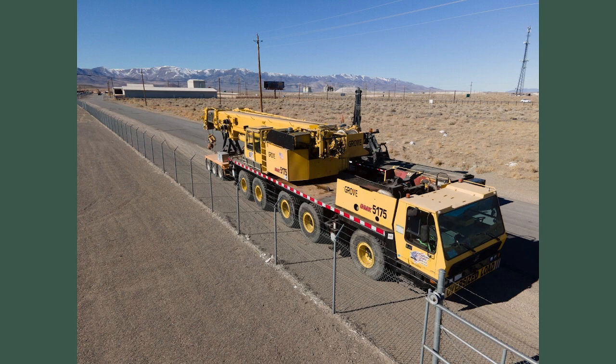The earliest walls have about a 3 or 4 day head start on the ones that they're pouring last. So I do anticipate we may see some of the walls start going up in sections rather than all at once. And something else they can do, I don't think they will, but we'll keep an eye on it, is moving some steel around and actually starting to place some of that interior steel within the building. And speaking of steel, we can actually take a look.